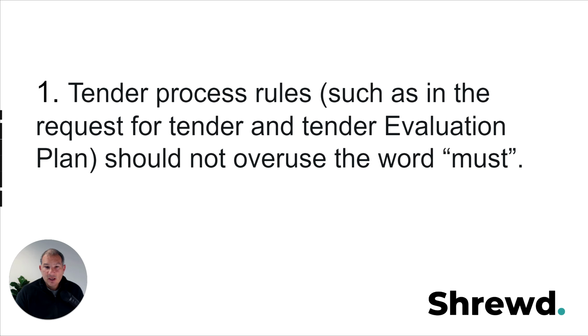For example, if you say you must create a shortlist when you're doing the evaluation, then guess what? You have to do it, when in fact you may want to retain some discretion to do that or not, depending on how many of your tenderers you want to progress, because there might be a clear winner from your tender process, and so therefore what's the point in creating a shortlist? All right, so that is number 1.